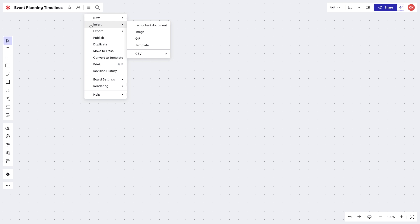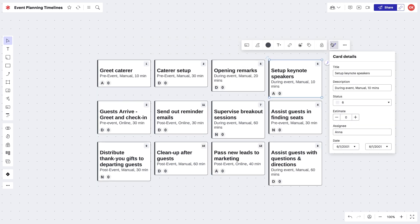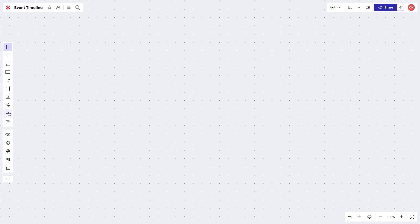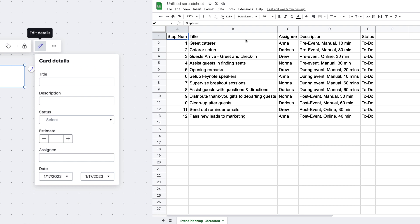Now that we've come up with some new ideas to implement with our event, we need to revamp the workflow and create action plans to integrate these ideas. Visualizing the various workflows can help us quickly weigh pros and cons and increase the effectiveness of our planning. To do this, we'll import our event planning spreadsheet data into Lucid Cards. Lucid Cards help you plan projects, provide important details, and connect that information to your project planning platform using one of our integrations. Before importing, similar to the quick sticky upload, we first need to organize our spreadsheet to match the corresponding Lucid Card categories. You can see those by dragging a Lucid Card onto your board and selecting edit details. Make sure each column in the spreadsheet corresponds to one of the Lucid Card categories, like title, description, status, and so on.